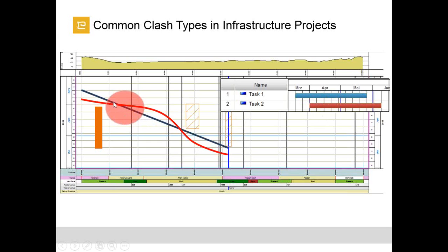So these two crews are meeting on our chainage, and we also know exactly the time. It is the beginning of April on this chainage where we have 2 crews, and the second one is almost the end of April, in this chainage we have the second conflict.